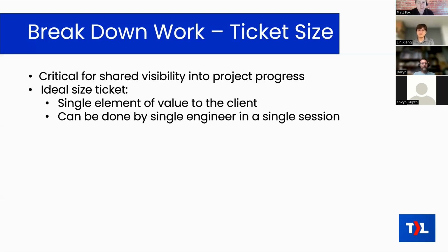That's a little bit fuzzy. There's an element of personal opinion about how to do that. Another way to think of it is also something that can be done by a single engineer in a single session. So if an engineer sits down for the afternoon, the engineer is thinking, okay, I can do this much work. I can get this bit of work done by the end of the day. That could also be a good size for a single ticket.